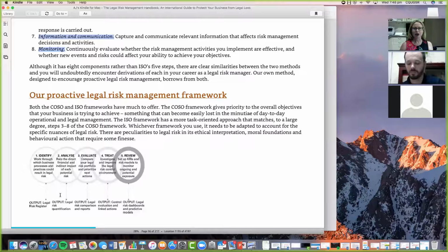Okay, then they get to the softer aspect of it. They say, what would the impact be on your reputation? Okay, and in the quest for hard-looking data here, they ask you to rate the impact on the reputation on a scale from 1 to 4. Okay, so you get a number over here as well, and it looks very, very hard data driven.